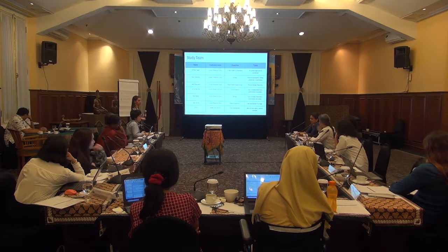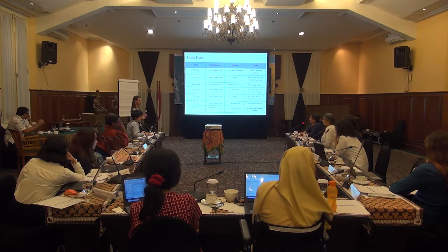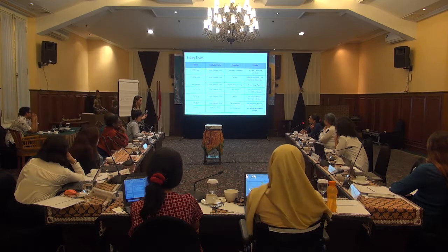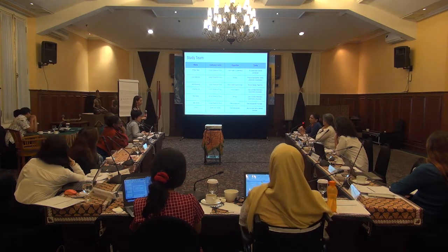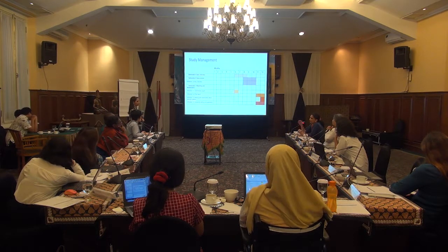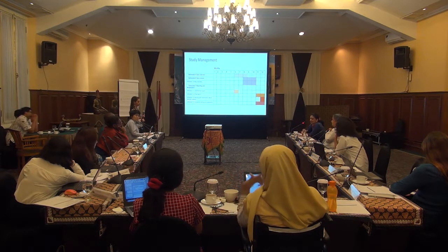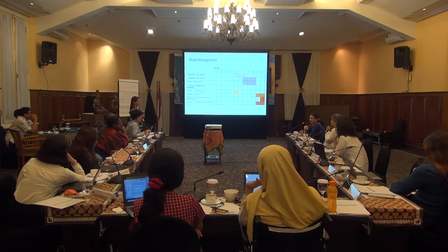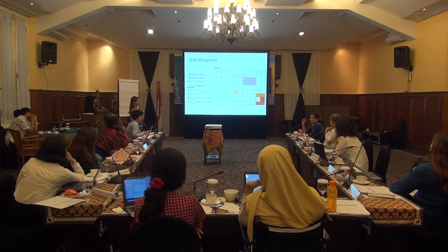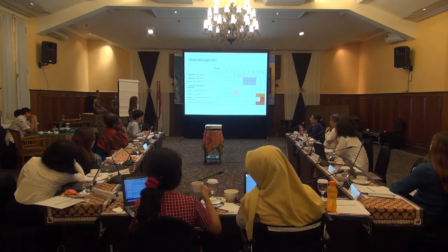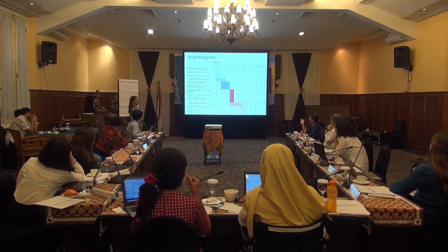Just on similar lines, one general comment for the Gantt chart. Of course, this was for the exercise, but when you do it for your own projects, try to break it down into as many small steps as you can. It doesn't matter how big it looks; if you've thought through each process and step, it helps you get a realistic sense of time. The broader the block, the tendency is to put less time. So break it down into as many small parts as possible.